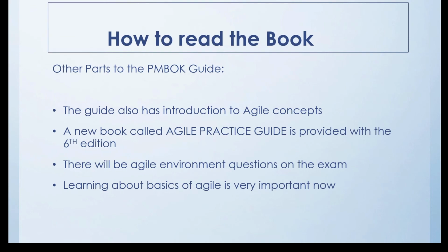On average, it used to be something like 30-40 questions just on the change control process in the past for the PMP exam. But that has diluted a bit because of the introduction of Agile concepts, because with our Agile projects, we did not have a change control process. So there is no PICC process, the perform integrated change control process, that we use with our Agile projects, because Agile projects are structured in such a way that they are open to changes, and there are changes happening pretty frequently in our Agile projects.